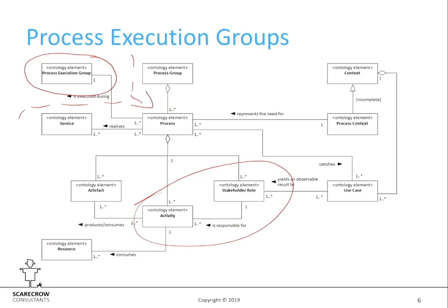If you've got something that says you need 200% of a modeler, and you've only got one person that has the competencies to fulfill the modeling role, you're in trouble. So we always have stakeholder roles as the resources that are carrying it, not people's names, because it's those roles that have to be filled.